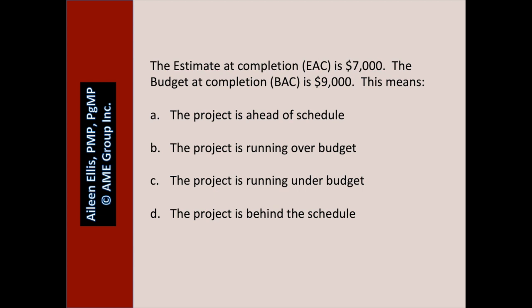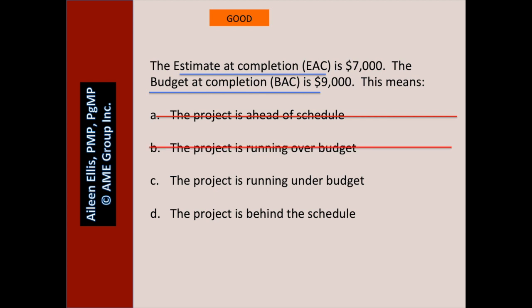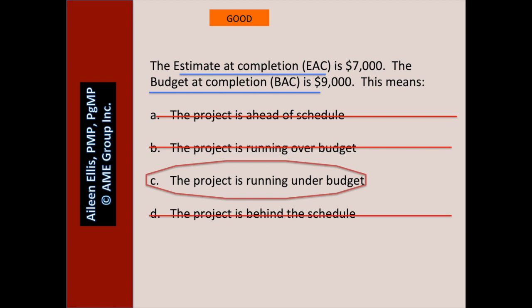The estimate at completion is $7,000. The budget at completion is $9,000. This means — before you get wrapped up in earned value, make it simple: we estimate the whole project is going to cost $7,000 and we have a budget of $9,000. Is that good or bad? That's really good — it means we expect to come in under budget. A: the project is ahead of schedule — we don't know. B: the project is running over budget — I doubt it. C: the project is running under budget — yes, that's why we expect to complete with $7,000 total even though we have a budget of $9,000. D: the project is behind schedule — we have no idea.